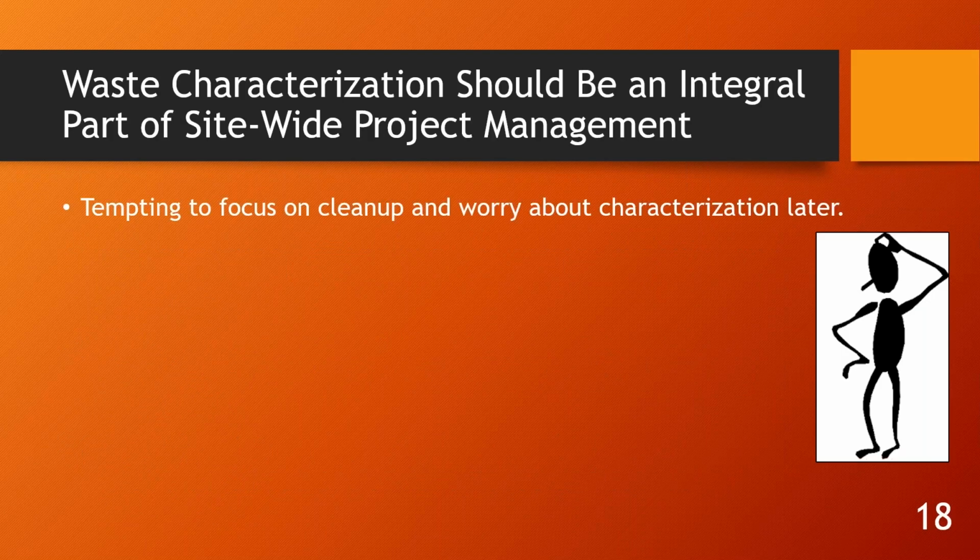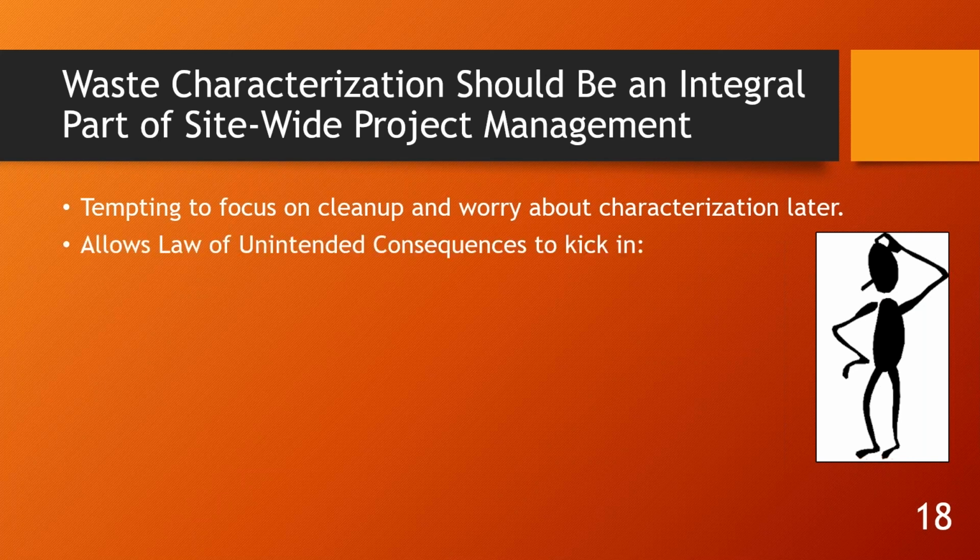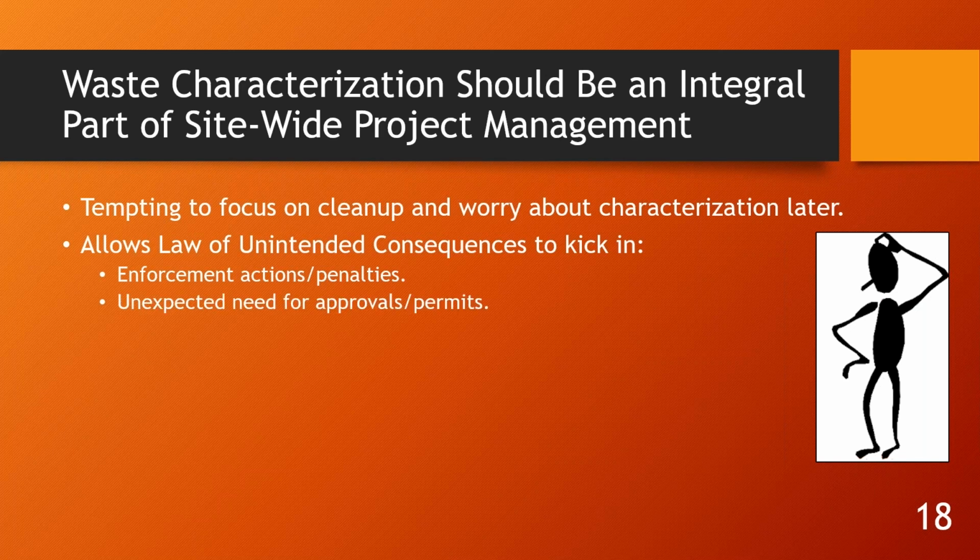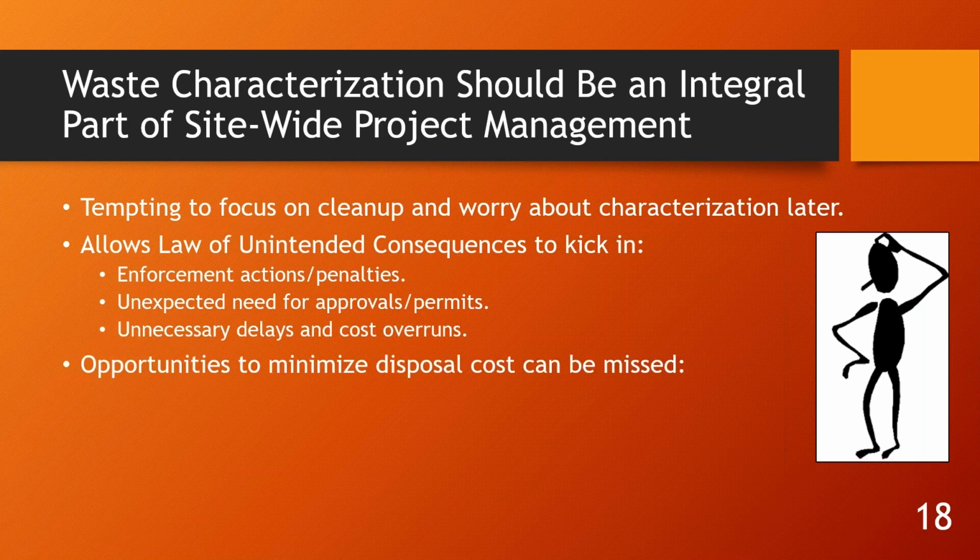So it's tempting to focus on the cleanup and worry about the characterization of the waste later. We all tend to do that, but the law of unintended consequences can kick in, subjecting you to enforcement actions, need for approvals and permits that you didn't recognize beforehand, delays, cost overruns. So opportunities to minimize those costs can be missed.